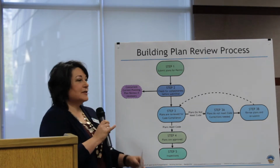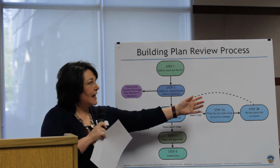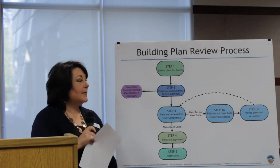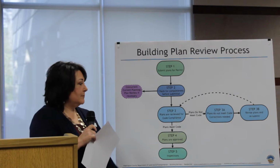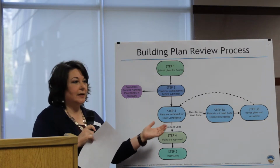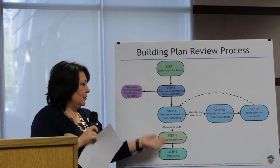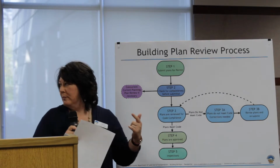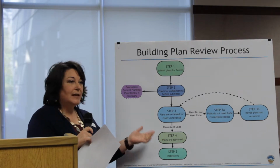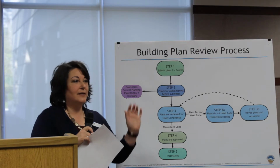Okay. So you'll submit your plans. We'll check it for completeness based off of our checklist there. And if it's complete, then we'll start the review. Our self-imposed 2-week turnaround starts at that time once it's complete. And then you'll get a call from our permit staff saying your plans are complete, come pick them up, and then you can start building and getting your inspections, and then everything's great.